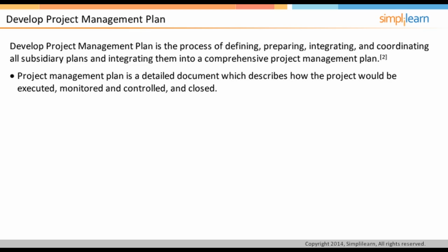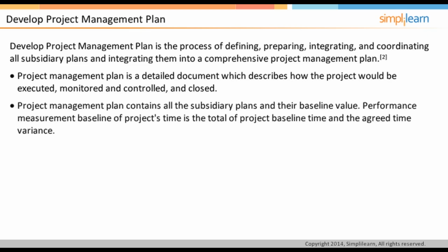Many people think that the project schedule developed using Microsoft Project is the project management plan. However, that is not true. Project Management Plan contains all the subsidiary plans and their baseline value. It also contains the allowed variance in the baseline value. Performance measurement baseline of project's time is the total of project baseline time and the agreed time variance for the